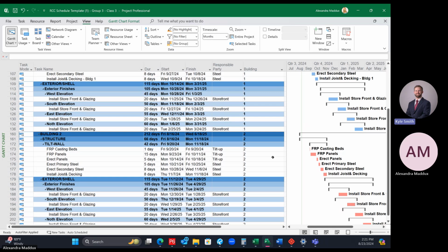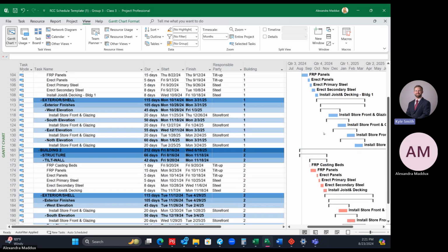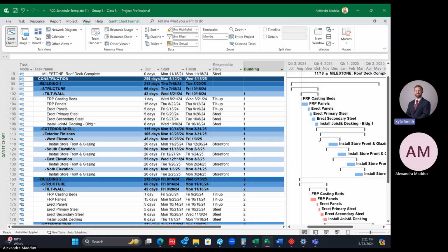Yeah, like your rec panels, you've got it written from 9/13 to 9/19, then a break going to 10/14 to 10/18, so you have to demob and remob the crane. You'd either have to bring that second building back or push the first building up. Does everybody see that, or what he's looking at here?